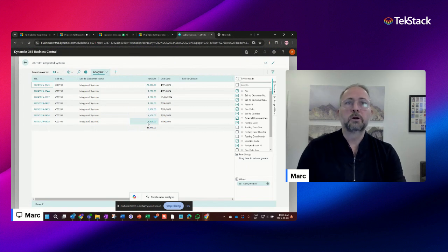The third benefit is that project managers can actually see what got invoiced. The fourth benefit is that you're not going to lose any billing milestones that should have been released. There's a way that we can show all the billing milestones expected by date, so you're not going to forget any of that. And probably the last really important thing is accuracy.